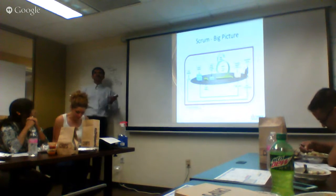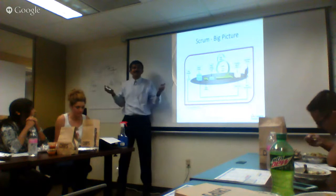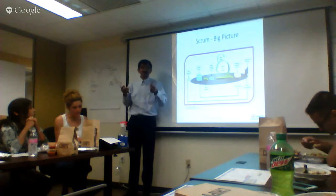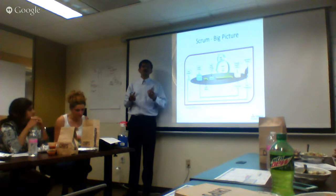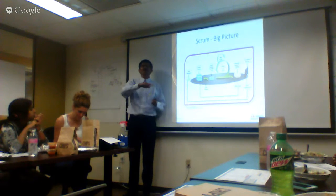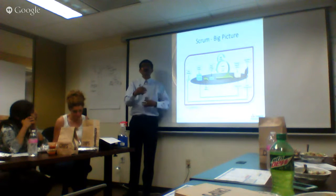Inspection is what I have done yesterday, what I'm going to do today, and what my impediments are. While I'm a team member, I'm providing the status to everyone. I'm not providing status to the Scrum Master, I'm providing status to team members. This is what I worked on today, but it took me this much time. So someone says, why don't you do this? Well, how about you do that? See, they are inspecting and adapting right from day one.